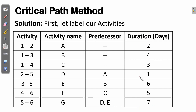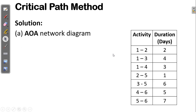After renaming the activities with new names — because we are going to construct a network diagram for activity on node — we need these activity labels instead of node labels. Now let's go to the first part of the problem: constructing a network diagram. We start with activity on arc, also called activity on arrows, meaning we are going to construct a network diagram with activities labeled on arcs. The numbers here represent the nodes.